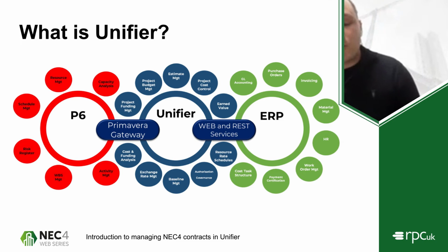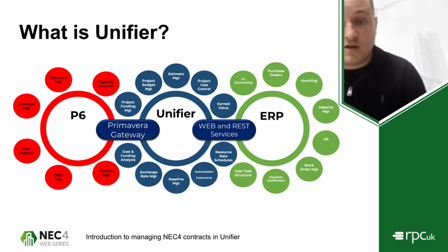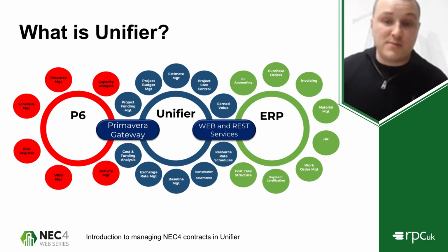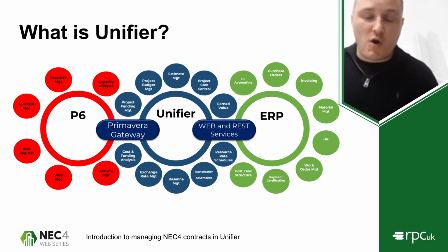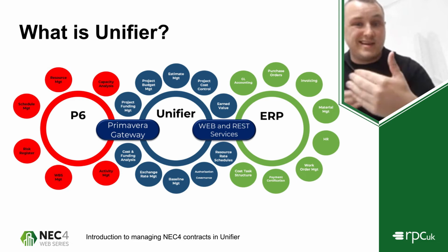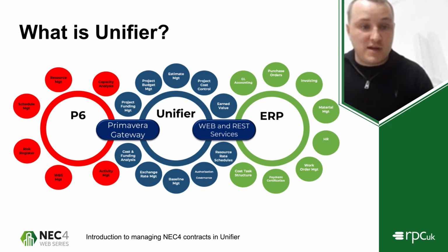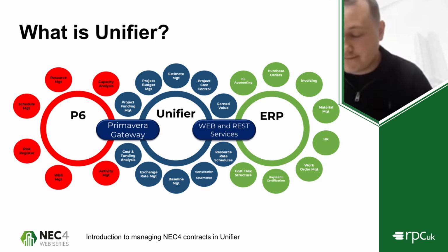So then from those forms, what we can do is build workflows to manage those. Again, for the program submission, we could create a simple workflow that is a creation, a response to that, and then a final end step. But that can be as complex or simple as you want it to be. So for that program submission, you could in theory do a creation, a reply, a send back for update, and sort of loop around until you get to an acceptance process. So those workflows can be configured to meet any requirements that you have.